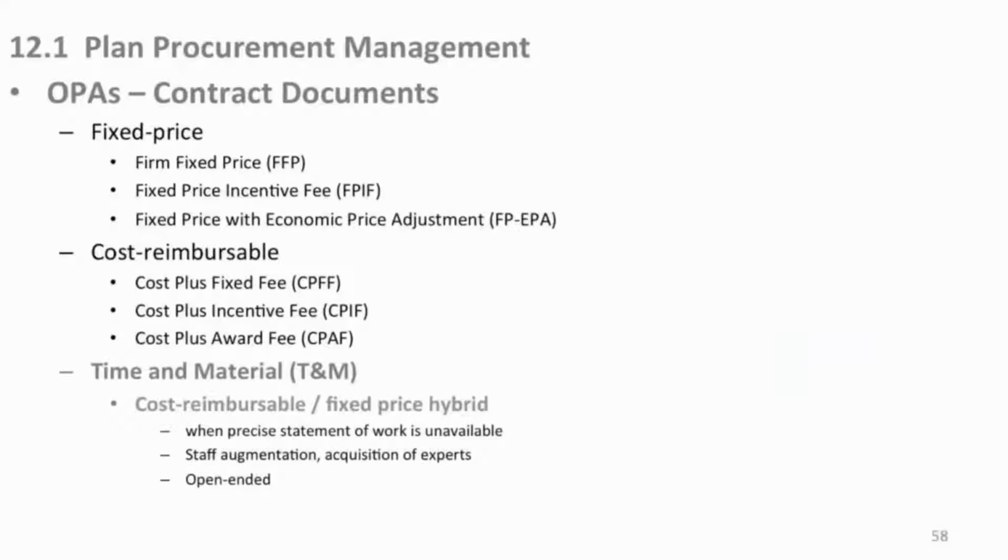And they will provide it because they have an open-ended contract, which is another reason, when we do the project charter in the beginning, if you have one of these time and material contracts available, that would be one of the agreements. Remember, why are our agreements way up in the beginning? Project charter. Here's a good example of why you may have an agreement, which is a big influence on how you would then manage to carry out the project. So they're open-ended. There would perhaps be a limit, you know, after a year we need to renegotiate our contract with the organization, but they're generally just open-ended.